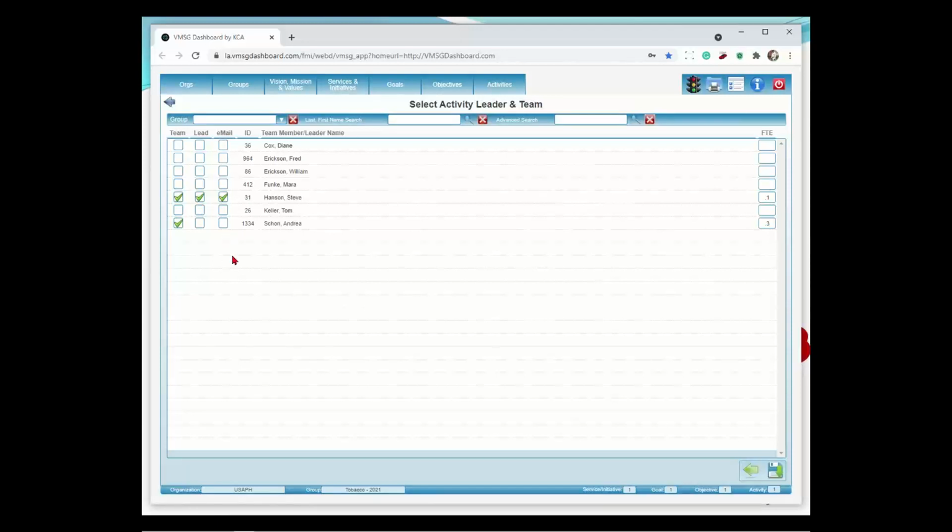The email notification is part of what we call the quick update system, real-time planning. The reason that's important is as you have gone through and created all your plans, your CHIP and your strategic plan particularly are going to have hundreds and hundreds of activities out there. You probably don't want to be the person who has to update all those activities, meaning you have to contact the people who are actually doing it, text or email or phone, find out exactly how they're doing, go back into the system and create the updates. The system does that for you.